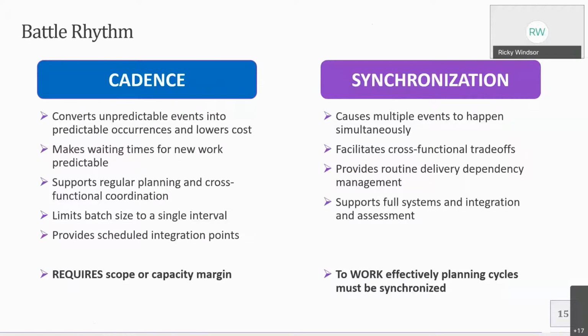So for instance, if you're going out on an operation and certain things are possible, say a piece of equipment fails. It's unpredictable that the equipment will fail. But if you have a risk mitigation that says, I have a spare, okay, great. It fails, I have a quick replacement, I can put it in, right? That's an easy example, right?